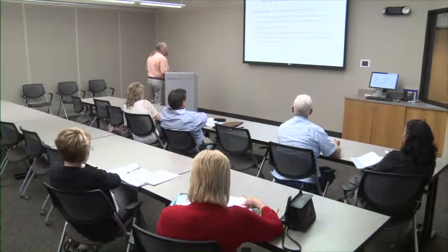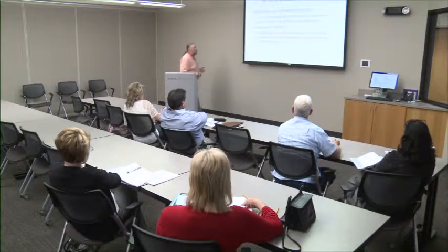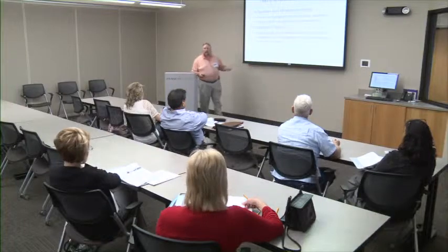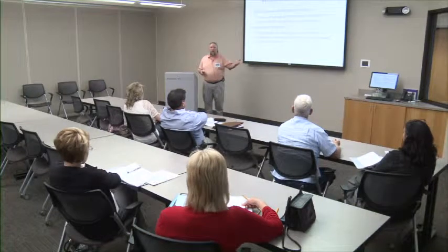And then when we see problems, delays, you know, the air conditioning unit can't be ordered for 6 months, or there was a tornado at the plant and it's been shut down and it's going to take an additional 3 extra months, we can get that information into our plan and make adjustments to our schedule to say we're going to have to do something different now.